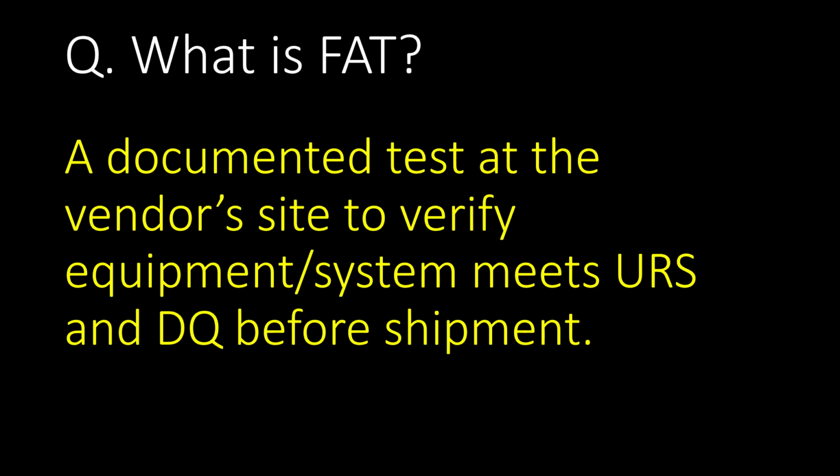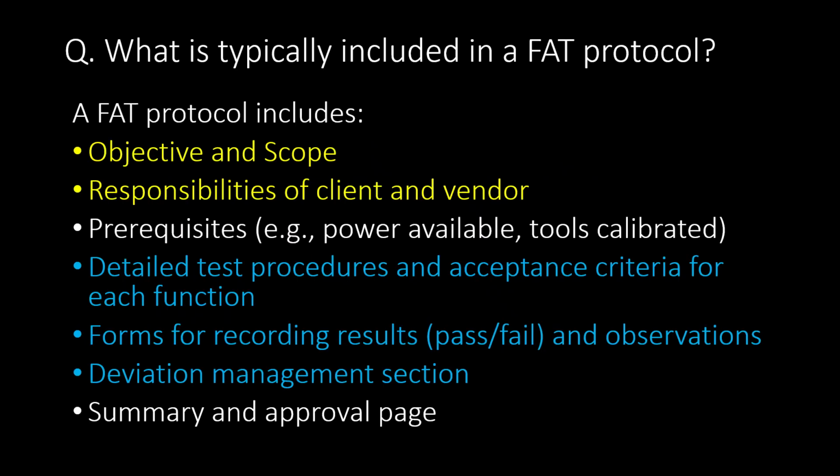What is FAT or factory acceptance test? FAT or factory acceptance test is a documented test at the vendor site to verify equipment or system meets URS and DQ before shipment. What is typically included in a FAT or FAT protocol?